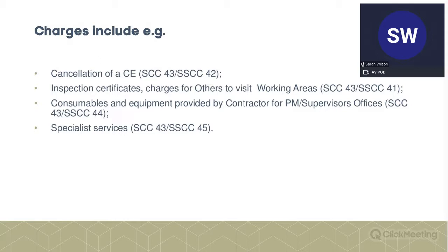With regard to options C, D, and E, it's basically any inspection certificate, because it's covering all of your work. So any payment to local authority, any type of charge. So just bear that in mind. It's a much wider scope for options C, D, and E.